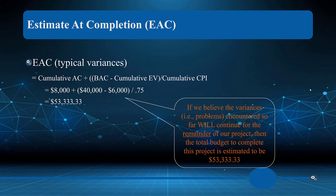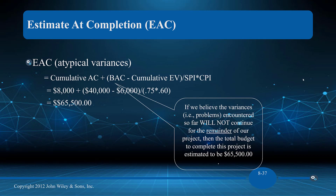Keep in mind this projection may not be realistic — the project may get back on track. The EAC formula uses cumulative actual cost of eight thousand, plus the BAC minus cumulative earned value, divided by the cumulative CPI. This tells us the project is going to end up at approximately fifty-three thousand three hundred and thirty-three dollars — a significant overrun.